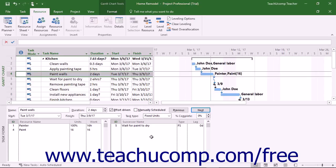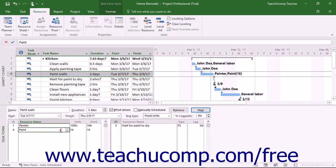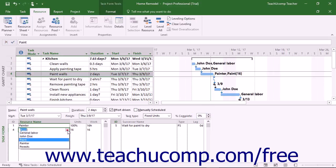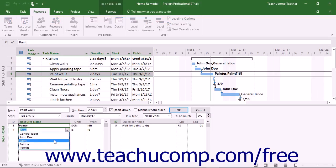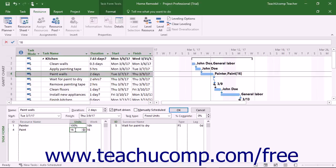Alternatively, to assign material resources to tasks, click into the next blank row under the Resource Name column for the selected task in the task form of the Gantt chart view. Then choose the name of the material to use and enter the number of units used. Then click the OK button to save your changes.